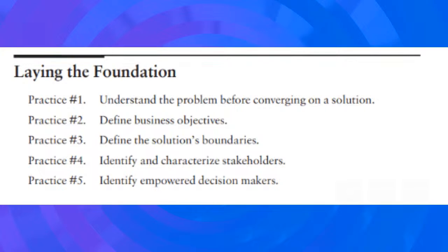In fact, people in general, I think one of the practices they have to keep in mind is our practice number 5, which is to identify empowered decision makers. Because the business analyst who's confronted maybe with a change request, the BA may not be in a position to make the decision about, do we accept this change request? If so, what do I do with it? But someone has to make those decisions. So in identifying the many kinds of requirements related decisions that you encounter on a project, make sure in your project or your product, who are the people that are going to make those decisions and how will each of those groups make their decision? That is, what decision rule will they follow? Those are all important things, and your BA may just be a victim of that process, but they need to know how that is all done. I think you get it.